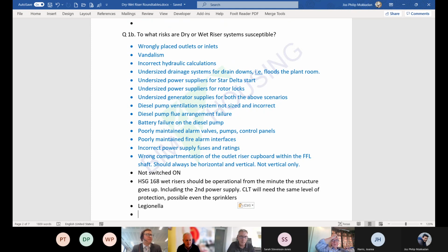No, that's the feedback I've had from the M&E installation companies. That's why people tend to pretty much throw away the model. From a BIM perspective, there's this perception that the BIM model starts and then gets updated through the process, and in practice it doesn't, because nobody that is actually going to rely on the BIM model for coordination and installation will want to use the original consultant's model, because they don't know how it's been built.